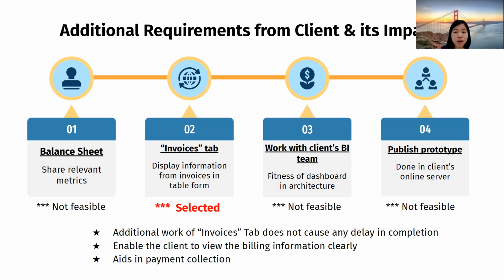Then, they also requested us to work with their BI team in determining how well our dashboard can fit into their architecture, and lastly, publish the prototype onto their online report server. These two requirements are not feasible for us because a lot of time would be needed to get to know the new department well, but we all have a time constraint on the project. Furthermore, all these are also out of scope and we do not have any access to the client server.